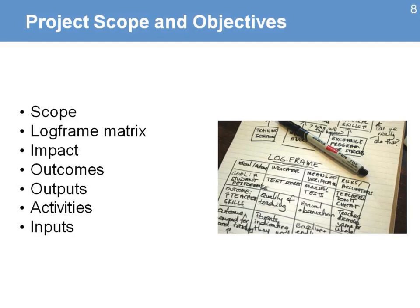The project's scope and objectives is the opportunity to present what is the work of the project. You can even make a copy of the log frame matrix and give it to participants so they will have an understanding of the elements of the impact, the outcomes, outputs, activities, and inputs of the project. It's a good summary for them to have an idea about the project.